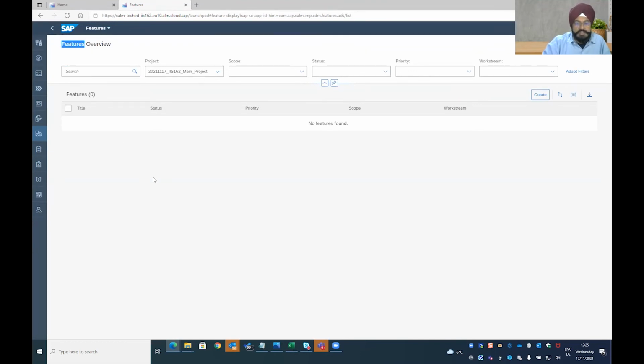That means it's something that you want to ensure is documented and also delivered along with that, right? So a feature can be a larger unit which contains smaller units such as user stories and tasks. So you basically have multiple things. Maybe they have the same transport, but different user story. A typical example could be, yes, there was a development done and a customizing done, but they should be going together to production, right?